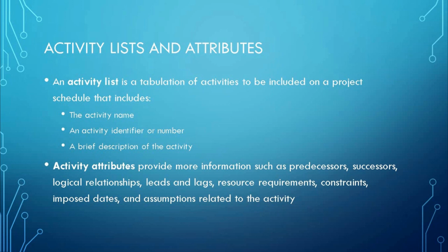Some types of activity attributes can include those related to time needed to complete specific components, cost related to completion of an activity or of some specific components, activity codes, responsible persons, and or persons involved in the activity, specific locations in which the activity may be taking place, and or other miscellaneous categories into which these attributes can be conveniently and appropriately organized. Activity attributes can also include discussion of specific constraints that may make completion more difficult.